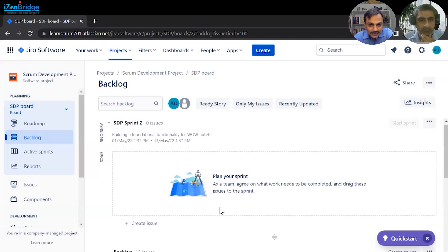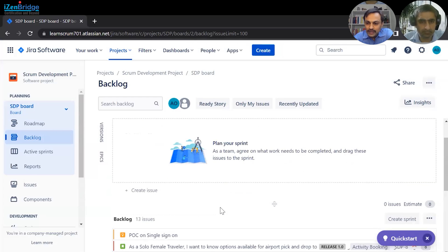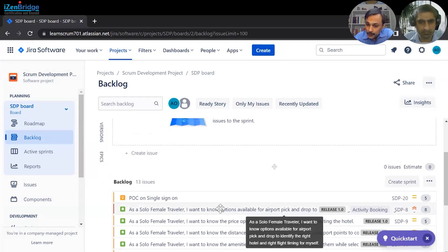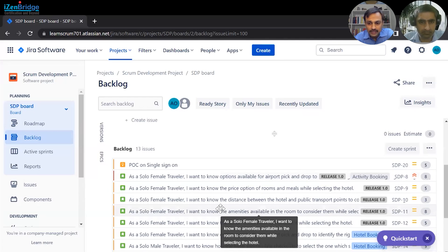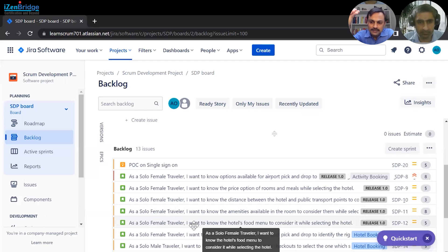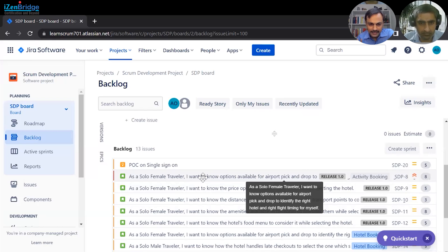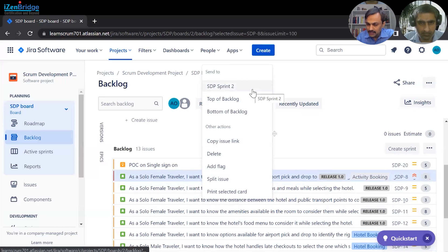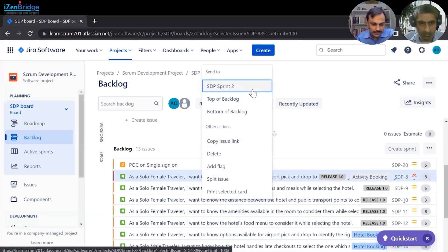Now the sprint is ready, but there is nothing in it. When you are having a sprint planning meeting, your product owner will have already prioritized the product backlog items and you may have already estimated them. You need to pull some of the items from the product backlog and place them into the sprint. It could be a collaborative act — you discuss first, and once discussions are over, you map out which items you want in the sprint. You can do it one by one or in bulk.